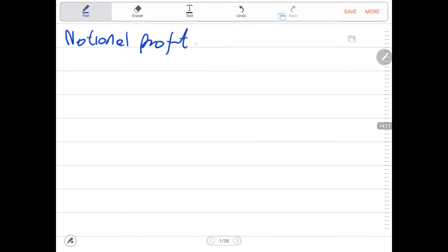This is number A. Notional profit, we know that it is the sales value of the work that is certified. It is the value of the work certified. Then we deduct the cost of the work that is certified. Please write everything. I just don't have enough space.